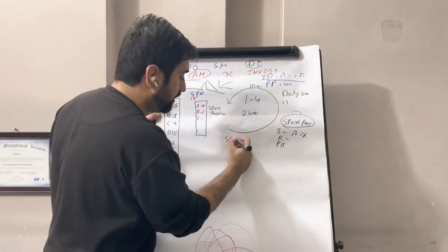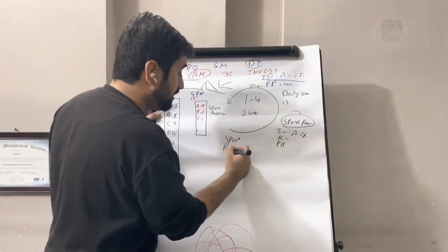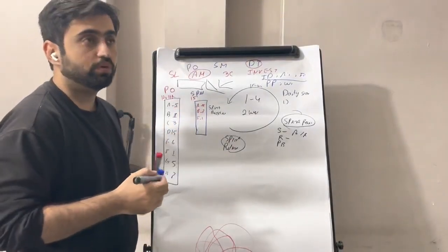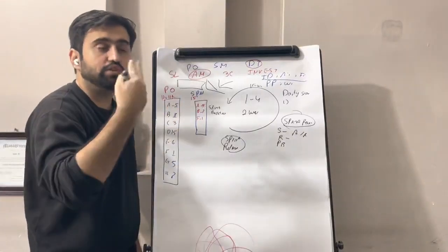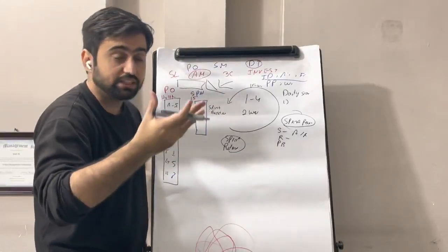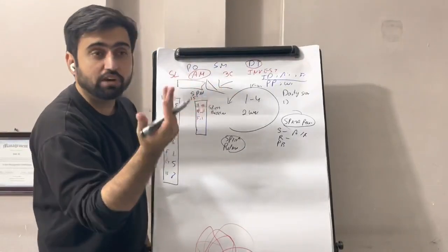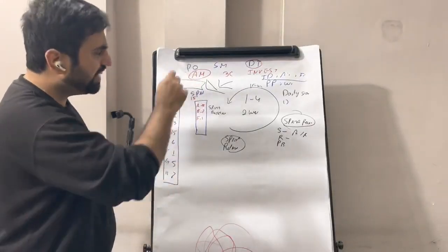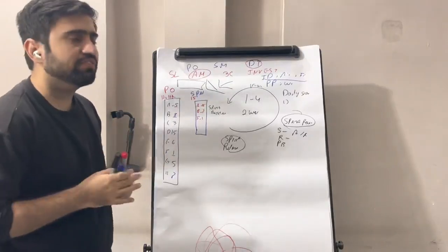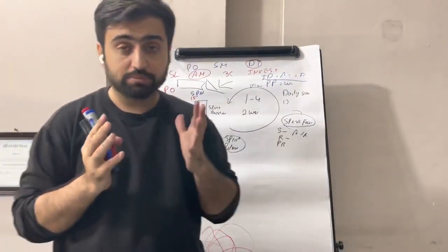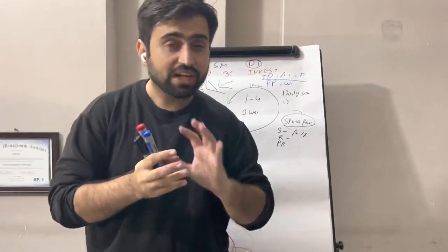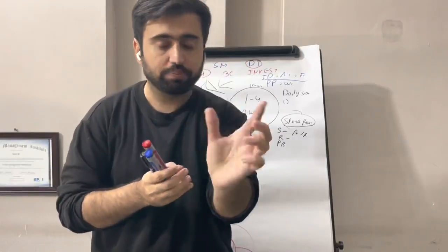We have the sprint retrospective to see how we are doing and what we can do. So we review ourselves: what we did good, what we did bad, how we can improve. There are 5 stages: set the stage, in which we clarify why we want to have it; gather data; generate insights, root causes; and decide 1 or 2 improvements and close the retrospective. So that's the scrum flow that you need to understand for your PMP exam. I hope this video has been useful for you, and in the minimum possible time I gave you the right flow, which was a missing piece you need for your PMP exam.